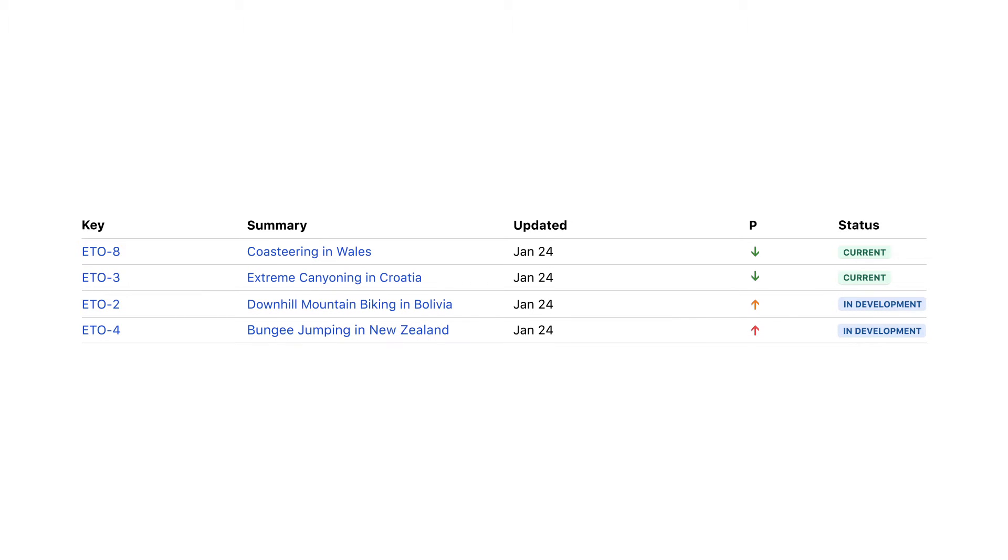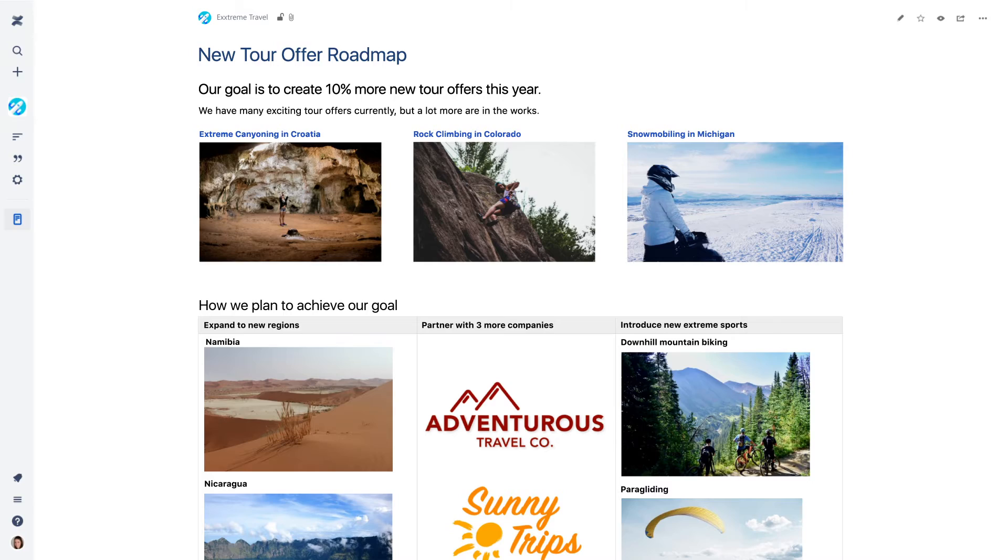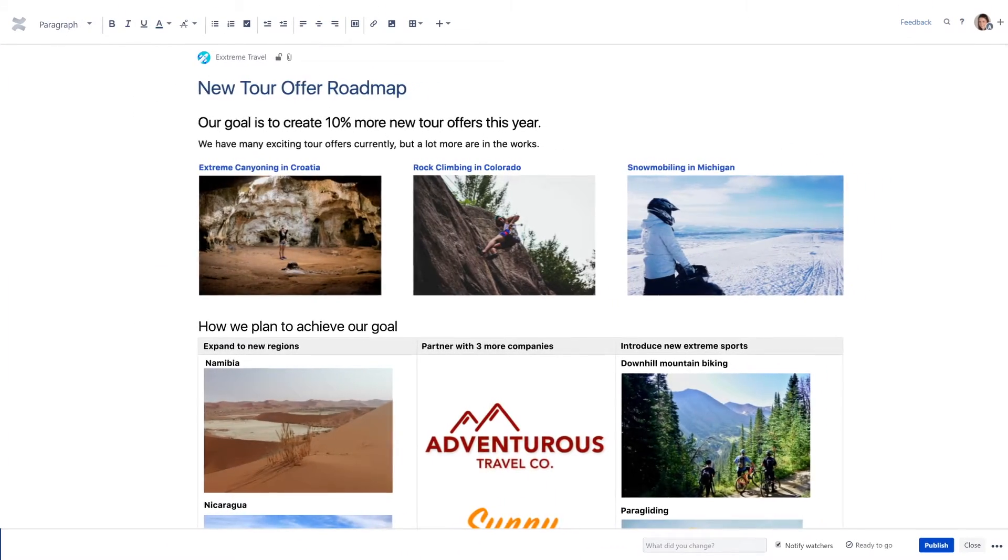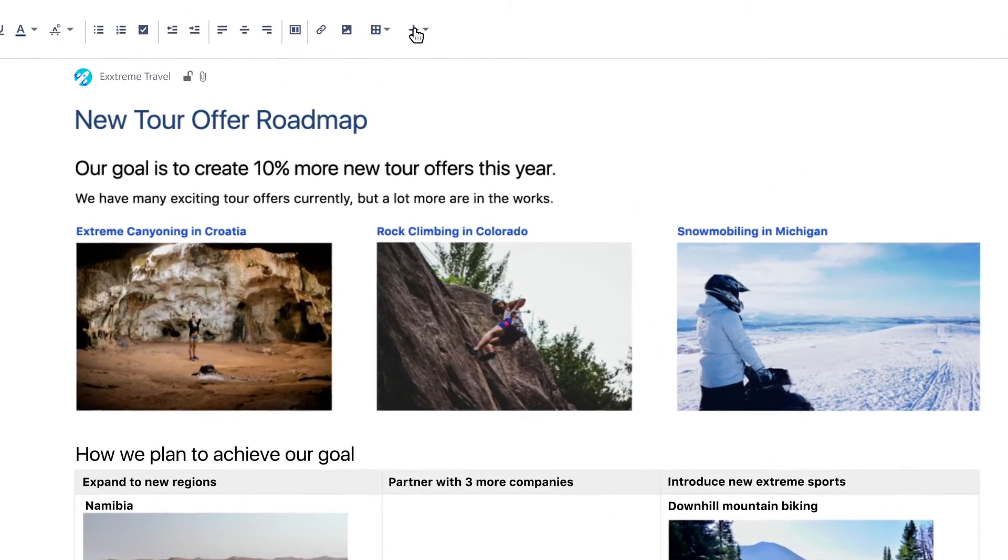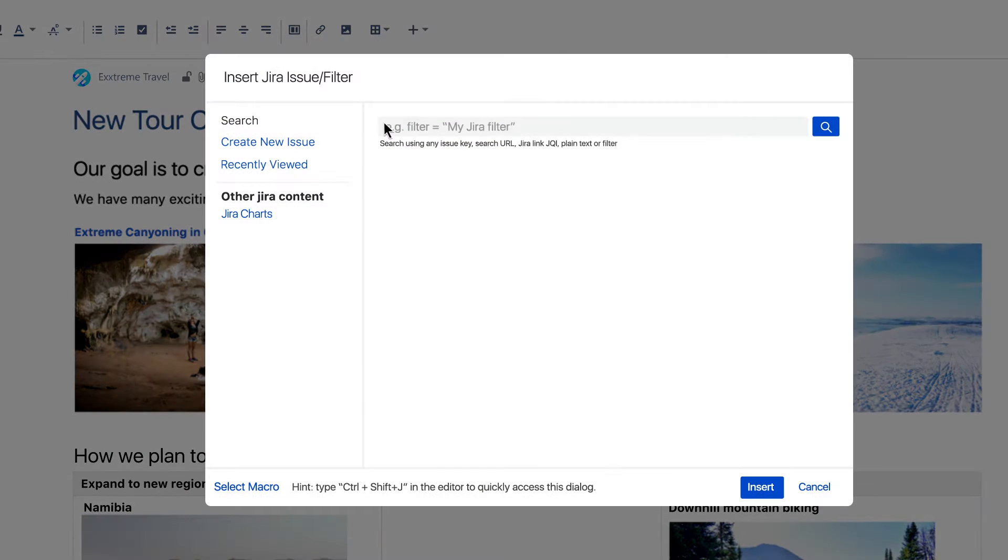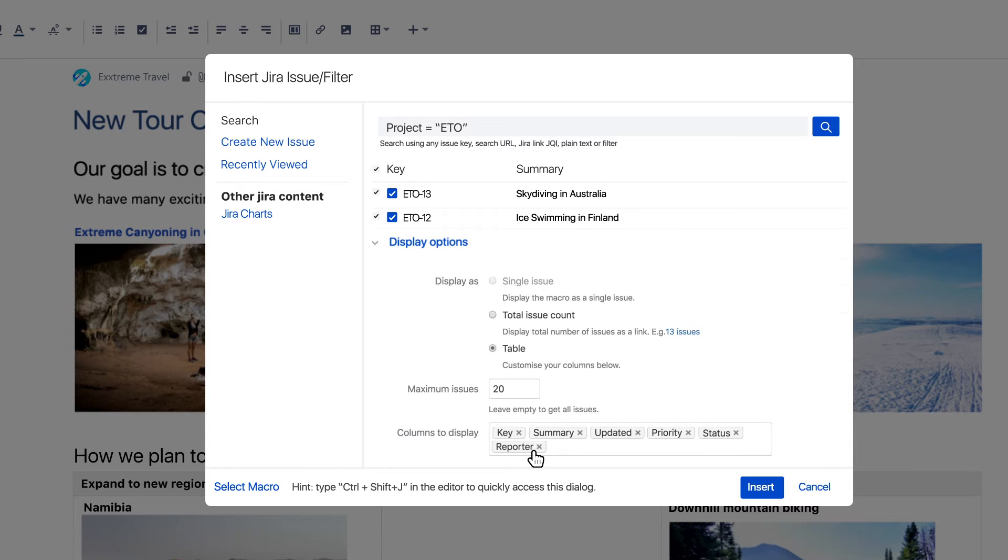Let's say you need to share the status of your product roadmap. Make one dashboard in Confluence to track all of your work. Get started by clicking the plus button and select Jira issues to add. Quickly search for any project or issue and select exactly what type of information you want to share on the page.